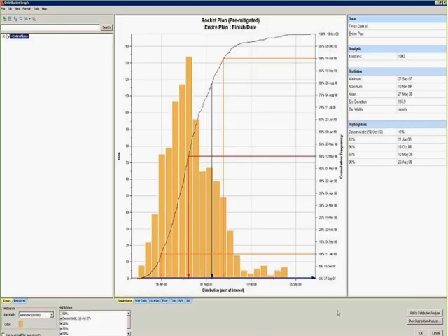And the finish date. Over here, same thing. There is less than a 1% chance that you would be able to deliver on the date that you said, and it would probably take you almost 8, 9 months longer than you had anticipated to be at 80. And probably at 90, it's 10 months. So that makes a huge difference in your planning cycle.